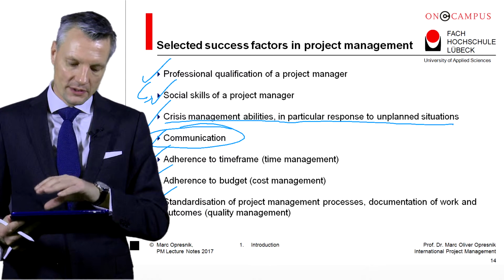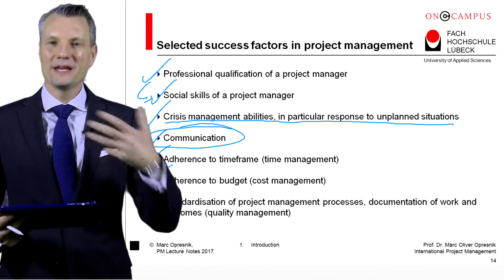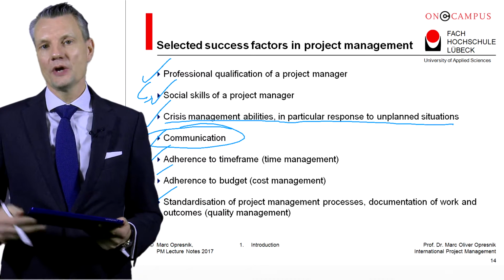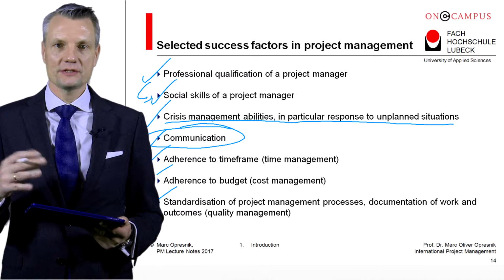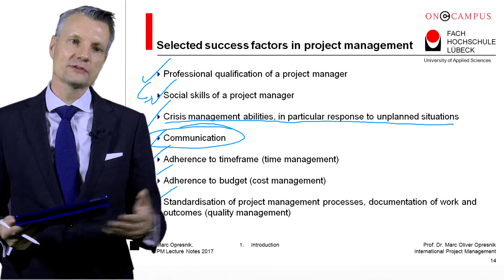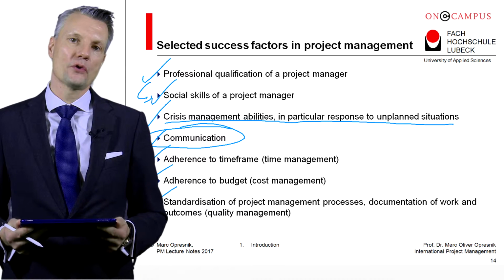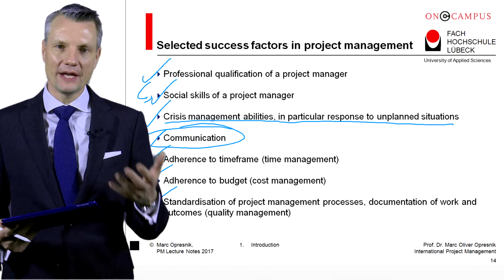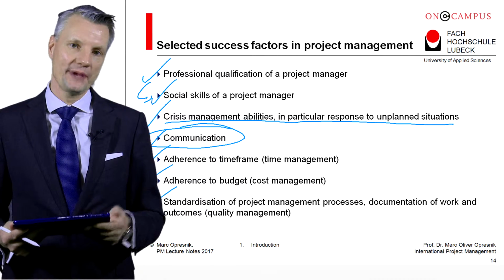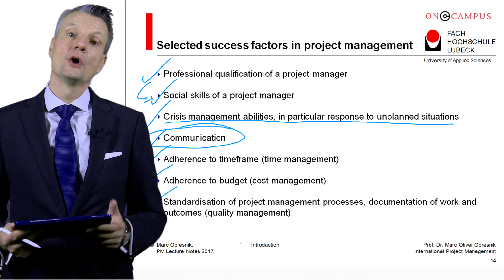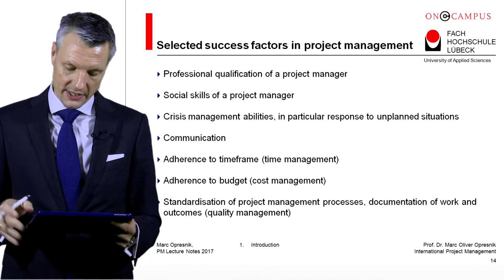So what I mean by putting an emphasis on this bullet point is that it pays off in the long run to have templates which are being used whenever a project is done in the organization. So it makes sense to set up something like a template for milestones, for example, when it comes to milestone planning, or when it comes to risk analysis. It makes sense to have a standard template which can be used every time a project is carried out or set up.